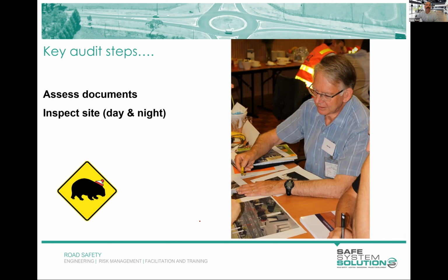And again, the Austroads guide gives you a little bit of a get out clause there at the nighttime, but it stresses that it's a very important thing to do, and it should be rare not to do it. Now, the reality is you are at the request of your client. And if your client says no nighttime inspection, you don't need to do a nighttime inspection. It's their choice. Hopefully they've made that choice with good knowledge of advantages and disadvantages.